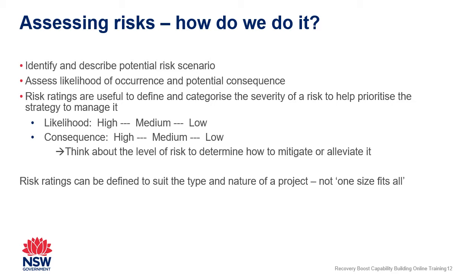Risk ratings are a common way of categorizing the severity of likelihood and the consequence, which can inform how much effort you might put into mitigating that risk. Risk ratings can often be defined to suit your project. There is no one size fits all.